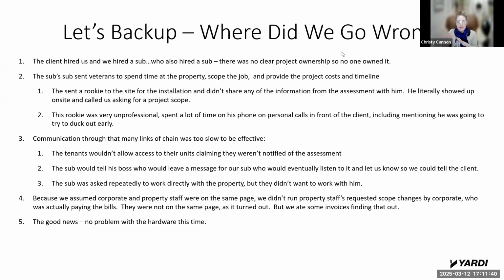And then what would happen is the plumbers and electricians would get on site. The property staff would say, nope, we're not doing electric and gas. All we want to do is water. As I mentioned, changing the scope constantly. And we let them, Yardi, not our team, but the Yardi team that was doing this, let them, but still tried to keep the same timeline. So they weren't properly managing the clients. And you all know how difficult that can be, but it has to be done.